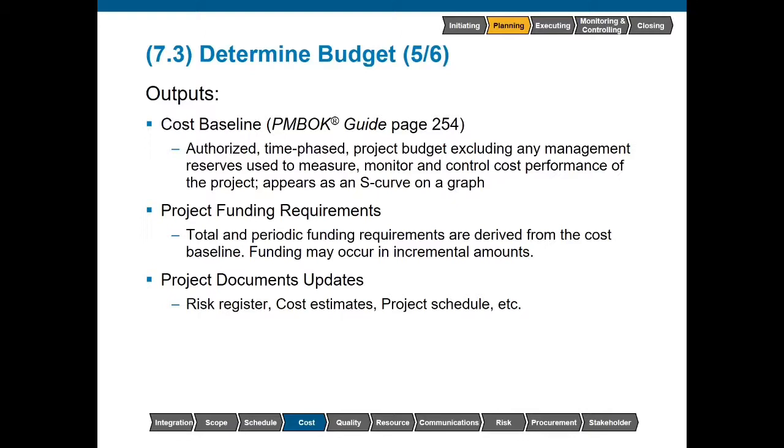So in the beginning, where we have very small expenditures, it's very narrow, very short, and almost horizontally moving forward over time. But that's going to be very sharp, going almost straight up at some points during execution as we're expending the majority of our funds. But that's going to kind of peter off at the end of the project as we start closing everything out. So you can kind of imagine it's almost like a sideways S in that regard.